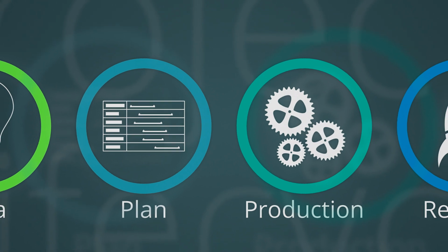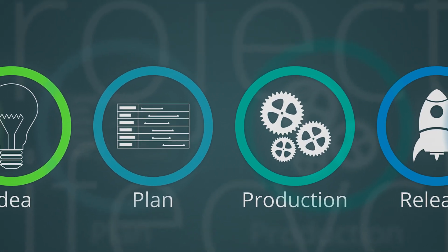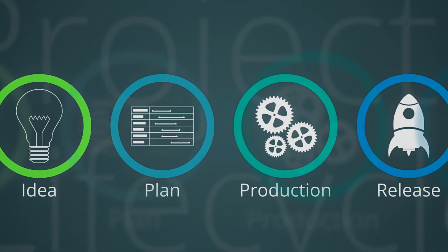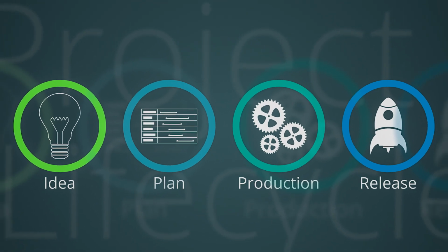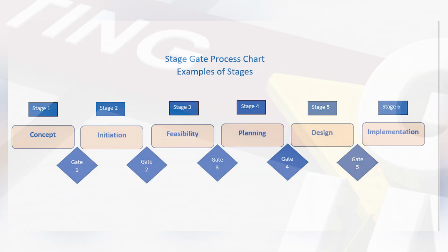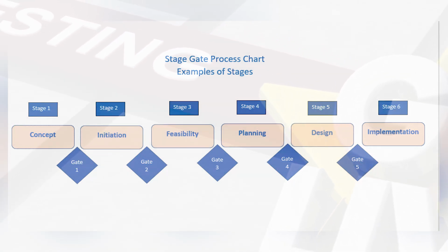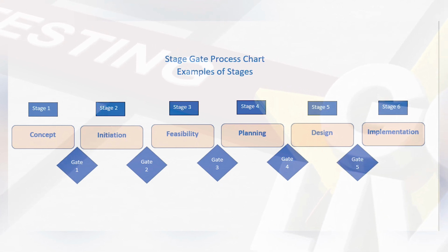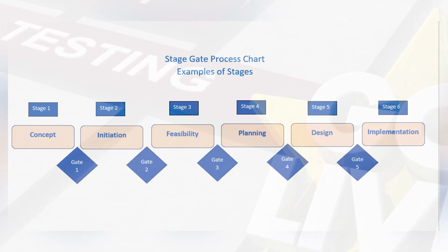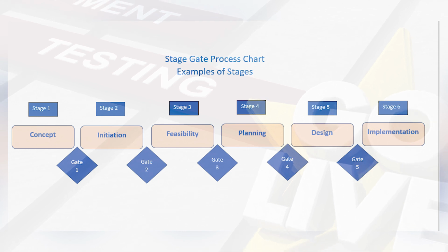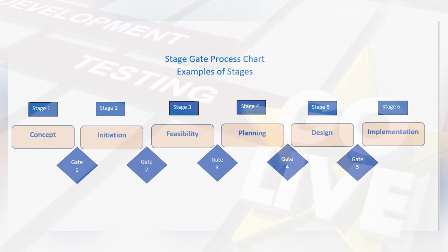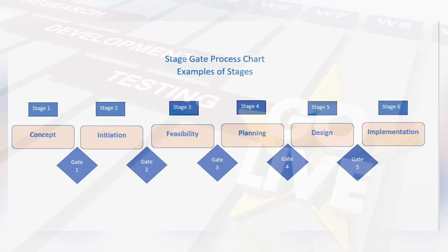Sometimes it will help if there's limited funding, which there generally tends to be, then it might be that certain projects take precedence over other projects, and this stage gating can help them establish that. And it also helps to reduce project risk. You're only releasing funding at certain areas of the time, and you're confident that the project is ready to go to the next stage to spend that extra money on.